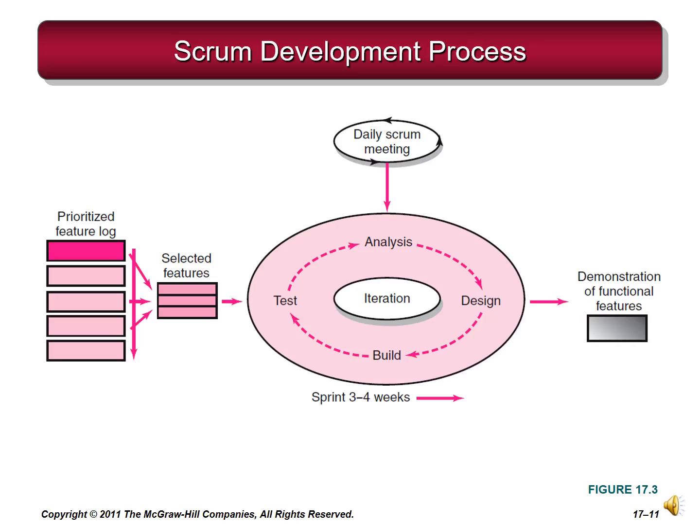The second phase is the development of a design that meets the requirements of the feature. The third phase is to build the feature so that it is functional. Finally, the feature is tested and documented. At the end of each sprint, features are demonstrated. Within this sprint framework, Scrum relies on specific roles, meetings, and documents or logs to manage the project.